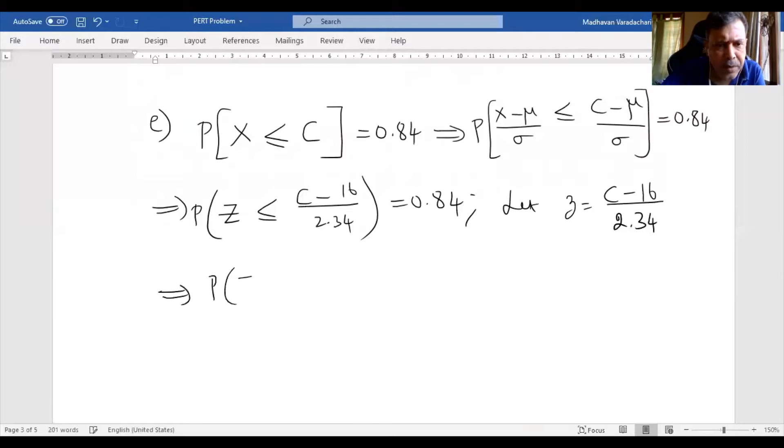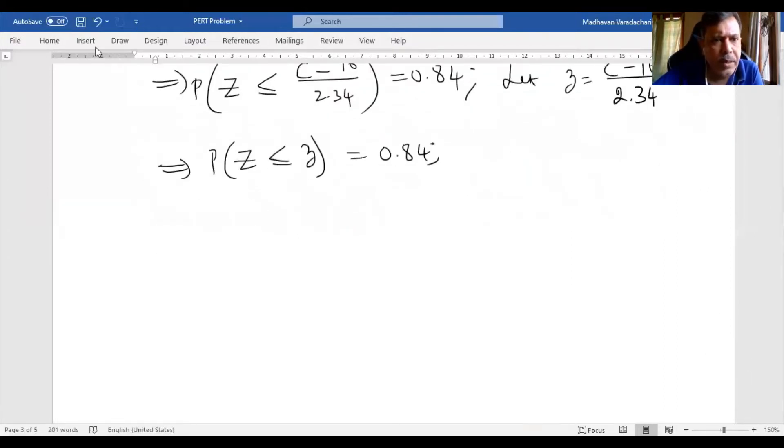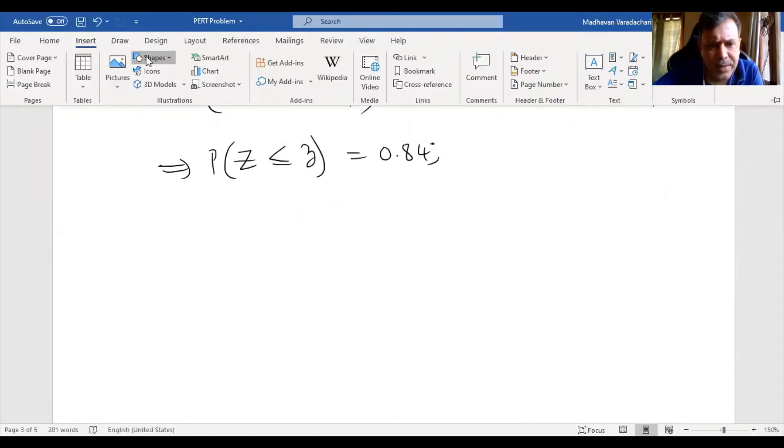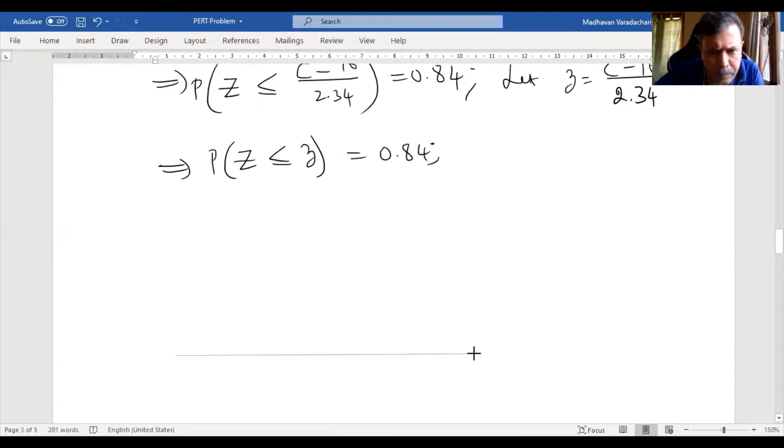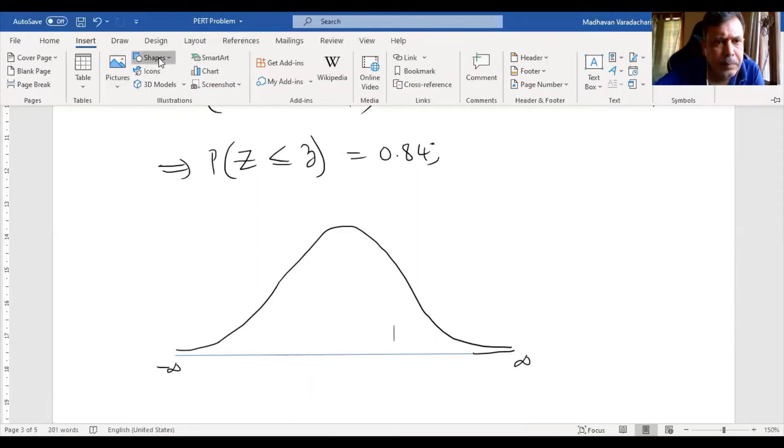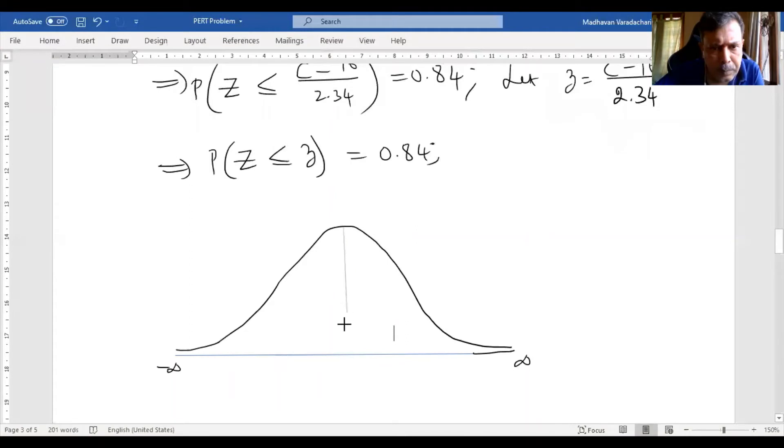So subtract with 16 and divide by 2.34. Let me recheck once again: 16 and 2.43. This is known to be 0.84. Now let us assume this entire thing as small z. Let small z equal C minus 16 by 2.34.